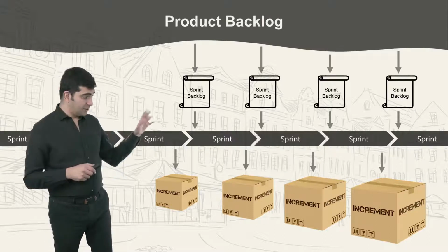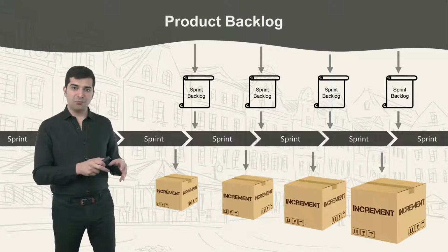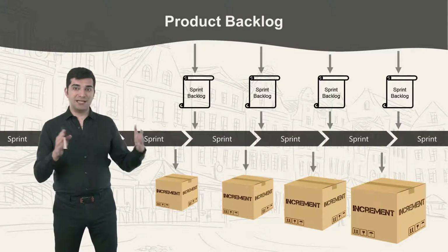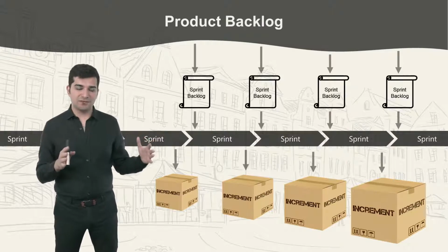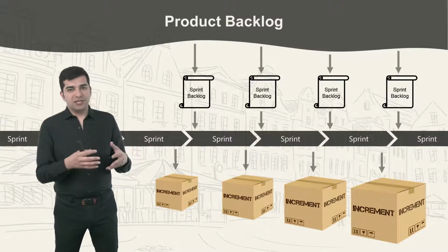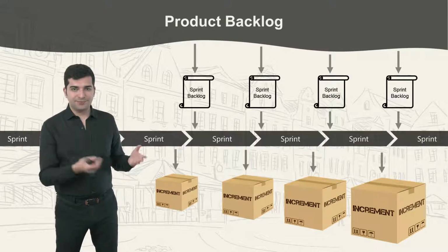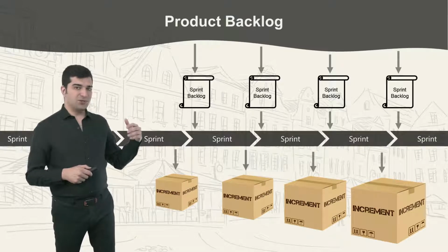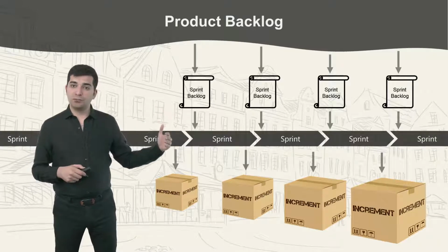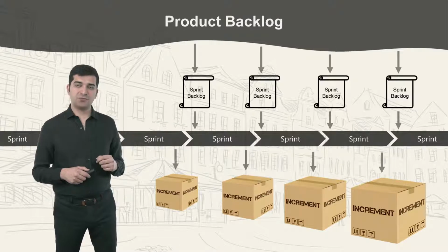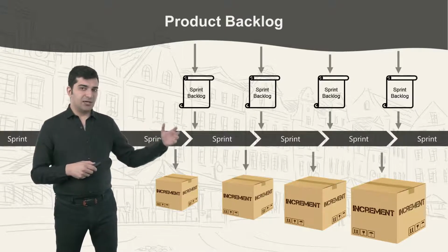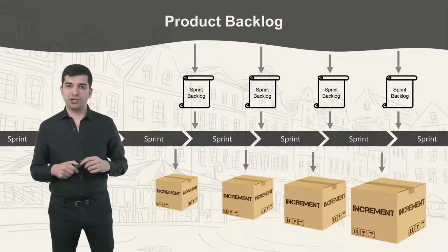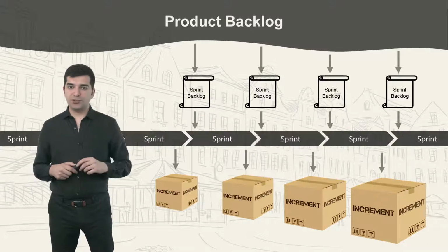And you remember that sprints or iterations are time boxed, and here we are using the word time box as a concept, which means that we don't extend the duration of that. They are all time boxed, but in DSDM we also call it a time box. That's fine. So here, that's the concept of a sprint. And sprints are maximum 1 month. You set the duration of the sprint, and normally they all have the same duration. For example, you decide to have 2-week sprints in your project. Each iteration will be 2 weeks.